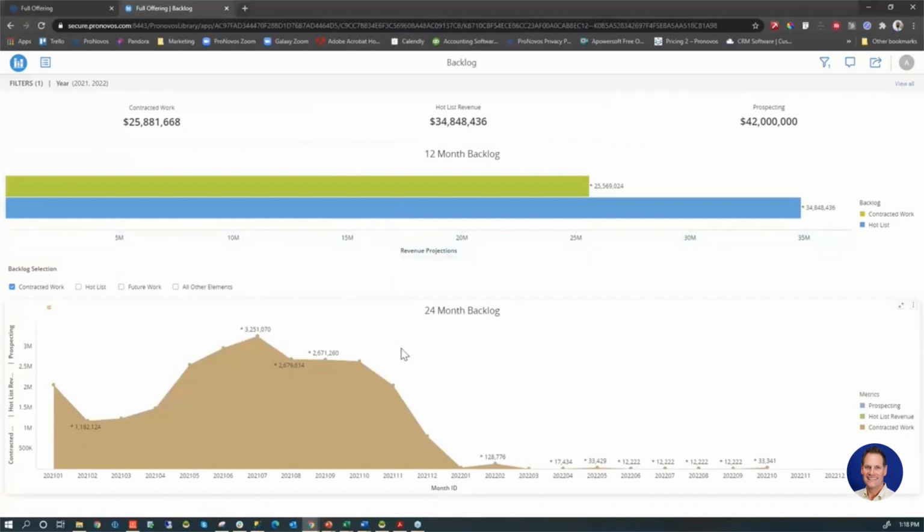And we do that by percentage completion analysis, and we'll talk a little bit about that towards the end of the time here. So this first block is what's under contract. You can see most of it is good for this year, and that's not unusual for us. I mean, our jobs are typically not large and not long in duration, but I do like to typically see at the beginning of the year backlog that covers us through, at least in dollar value, the next projected 12 months.